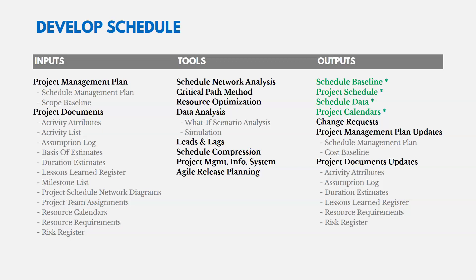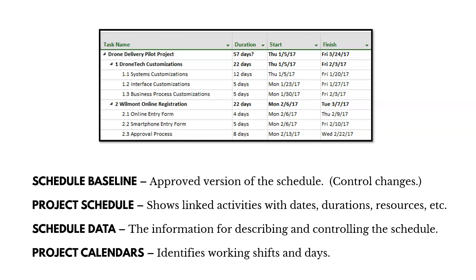The key outputs of Develop Schedule are the schedule baseline, project schedule, schedule data, and project calendars. The schedule baseline is the approved version of the schedule — you control changes to it and compare it to actuals. The project schedule is often something like a Microsoft Project file, showing linked activities with dates, durations, milestones, and resources. Schedule data describes and controls the schedule — similar to what a WBS dictionary is for a WBS. Project calendars identify working days and shifts.